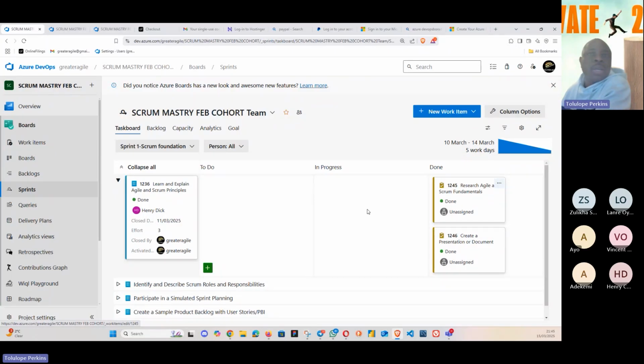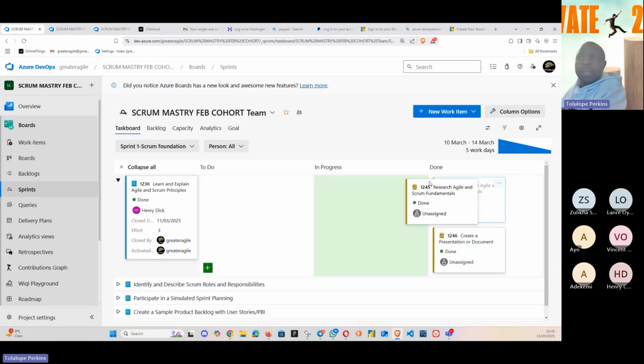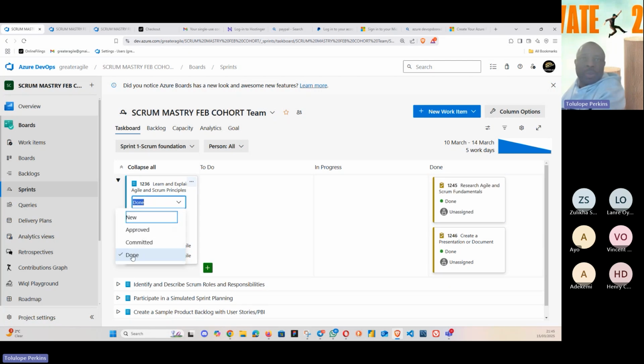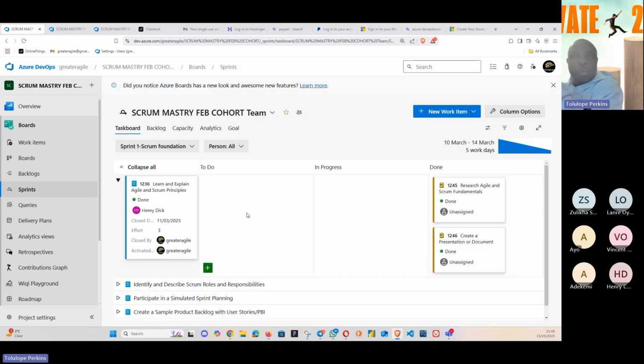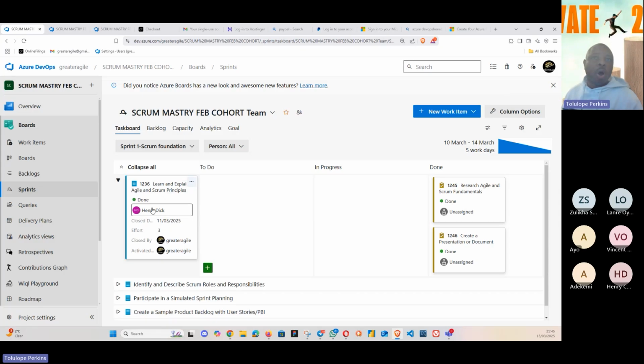So thank you for that. One thing that you did not do was, after you have pushed your ticket and everything is done, you need to come here and click on done. I know we didn't talk about that. That is when it will reflect on your burndown chart, which we'll talk about in a while. If you don't come here to close it, it will not reflect on your burndown chart.